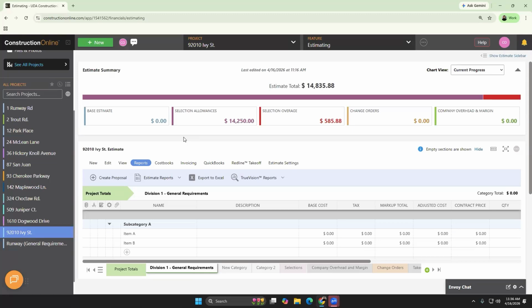from subcontractors and vendors. You're creating bid packages that go out to bidders, and within each package, you're defining the scope using bid sheets. So instead of building the scope from scratch, you can pull up categories, subcategories, and line items directly from your estimate. That's going to keep your subcontractors' pricing aligned with how you're already structuring your costs. Estimate descriptions often even carry over automatically, so everything stays consistent. Once bids come in, you can compare them side by side and award the work. And from there, you can generate a purchase order directly from that bid. So the estimate isn't just internal, it's already shaping how you're collecting and evaluating prices from your subs.